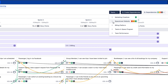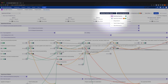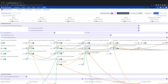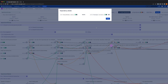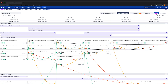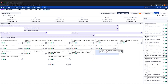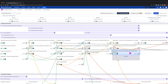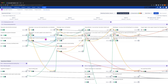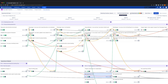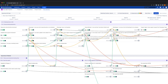To see if we have a dependency with another team, click the Teams drop-down menu. Coloured numbers next to a team name represent dependency number and health. When we turn on these teams, we can see how some of the external dependency lines change colour now that the team is in view. If there are remaining dependency lines that are external, this can mean that the dependent issue is in another program or a future or past increment, or from the team planning board, it can also mean that we have a dependency with an issue in our team backlog that we've not yet scheduled. We also want to create dependencies with another team, and we do this by turning on create dependency mode and clicking an issue in one team and then another team to create a cross-team dependency. It's really clear where we have dependencies between teams, and we'd want to address unhealthy dependencies directly from this view by rescheduling an issue through drag and drop, which immediately changes the health of the dependency.